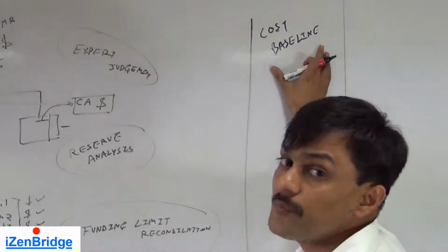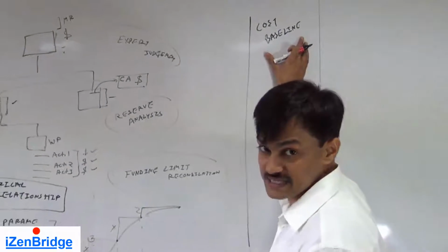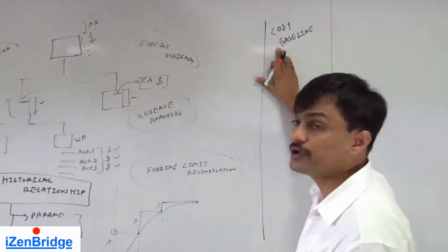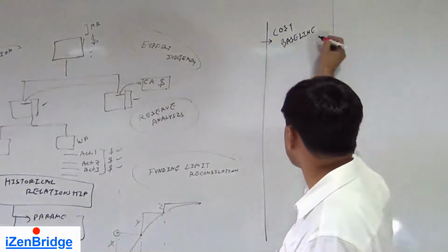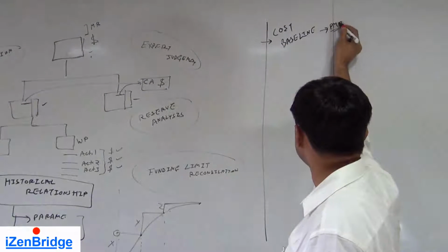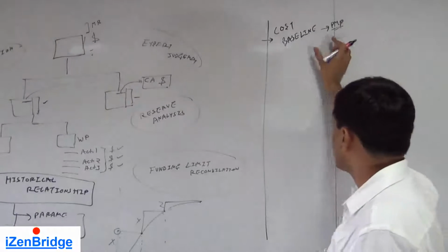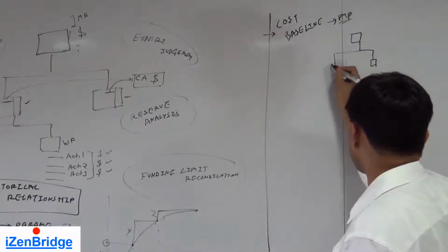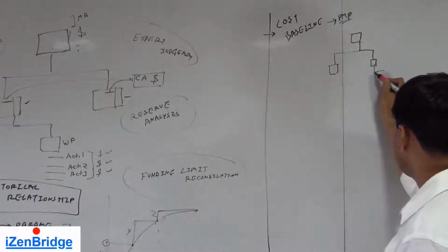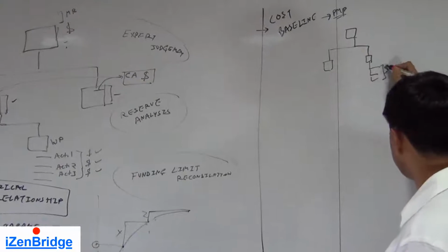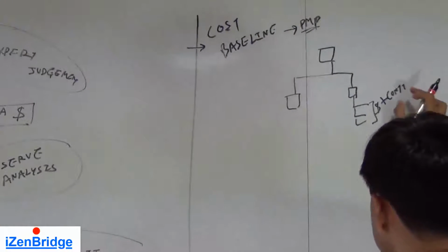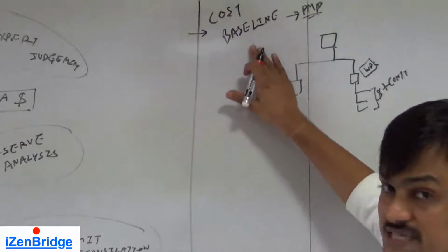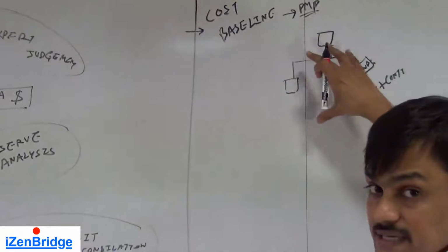Your complete earned value management system happens against the cost baseline. Your future project performance and cost control will be looking at this particular baseline. And this baseline will also become part of your project management plan, because the project management plan has all the baselines. Now the cost baseline has components, the way I explained the WBS structure while we were talking about aggregation. Similarly, we may have an activity level number and some contingency is applied here. So this contingency, and the contingency applied at WBS level, all goes into the cost baseline. So the aggregation of all these is the budget.